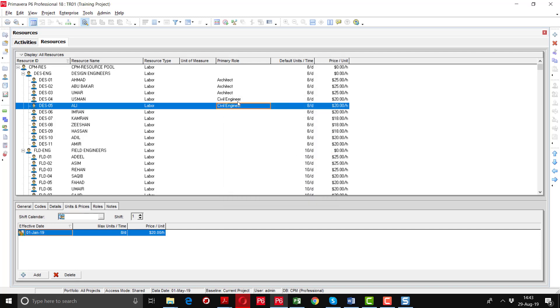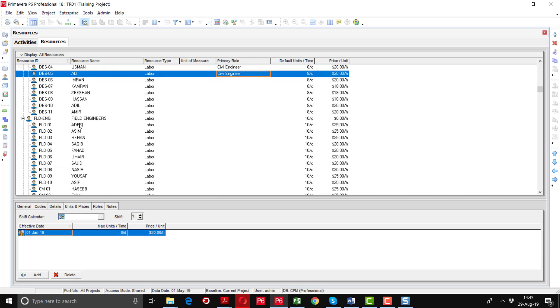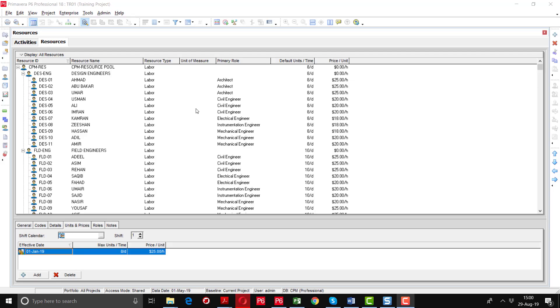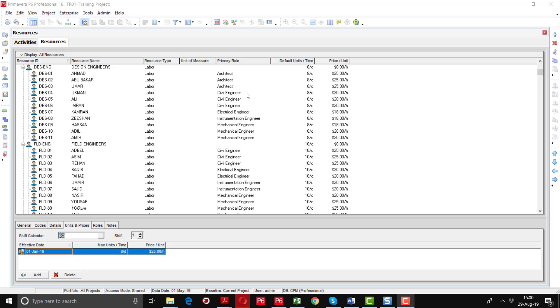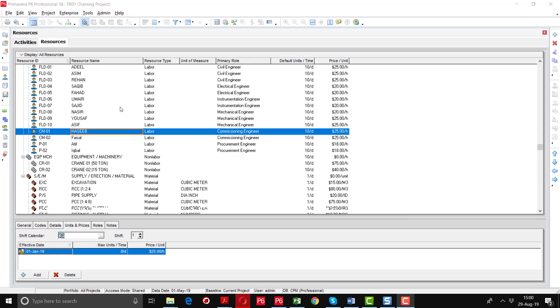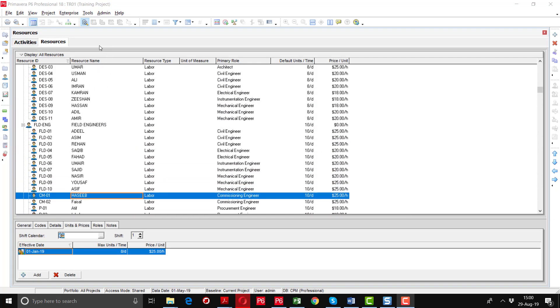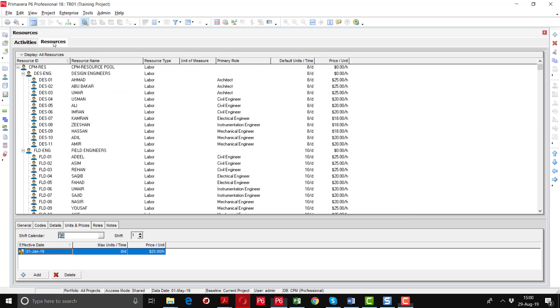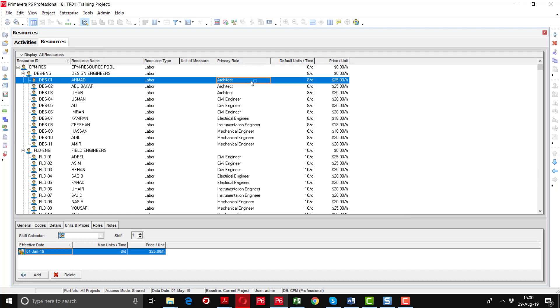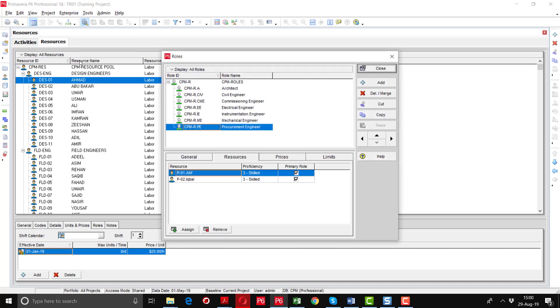In this way I will assign all the roles to different resources. Now you can see that all the roles have been assigned to different resources. So there are two ways we have discussed: either go to the resource tab option and assign the roles from here, or you have to go to the roles option by going into the enterprise options. Like this role button here you can see you have defined all the resources, after defining this you can assign from here resource tab as well.